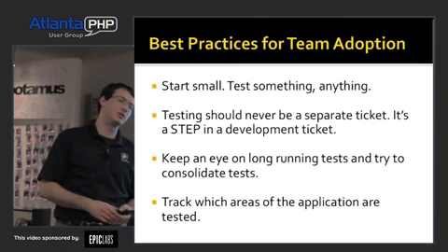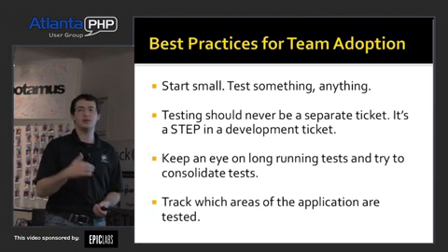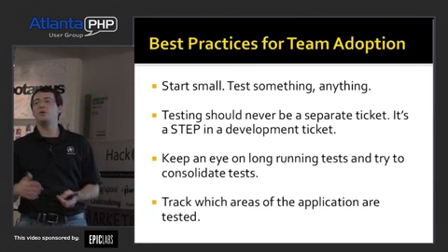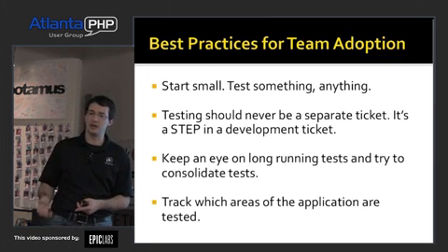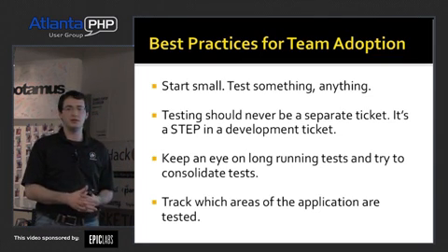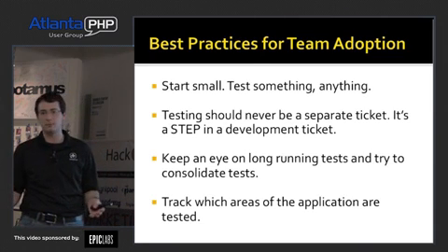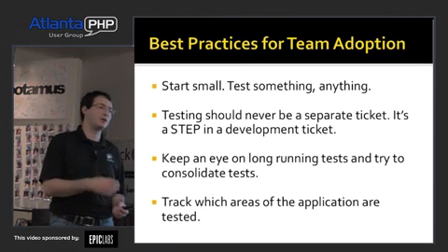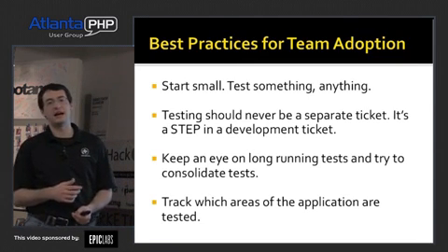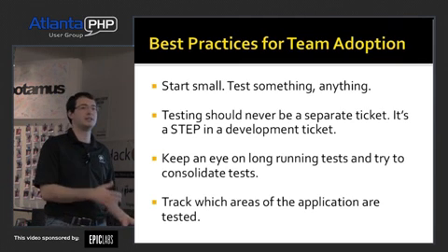A lot of people have written about this on their blog. One of the steps in our ticketing process is test development. All of our developers know that a ticket is not done until it has appropriate test coverage. And depending on the impact of the change, if it's a text change, do you need a full-blown Selenium test? Probably not. If you're rewriting the guts of our payment application or changing the JavaScript, it's probably pretty important to test that. So again, you need to use test coverage that's appropriate to the type of change.